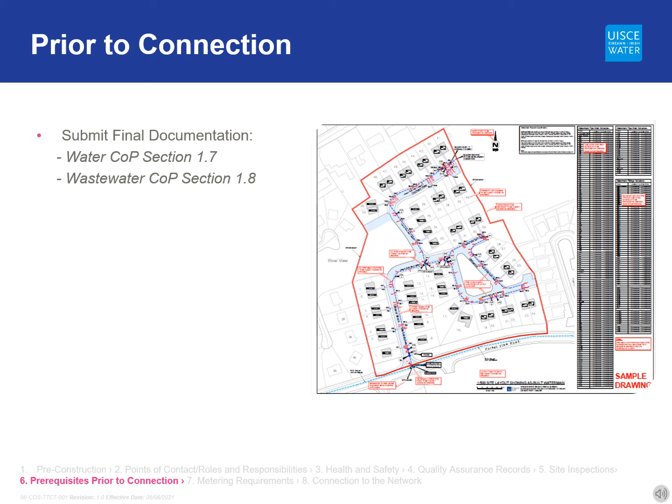Following a satisfactory review of the final documents, the field engineer will carry out a walk-off inspection of the site with the developer. If the works are in order, the connection will be authorised to be made by Irish Water's delivery partner, and a conformance certificate will be issued to the developer by Irish Water. If there are minor issues found on site, a defects report will be issued to the developer and the issues will then need to be rectified.